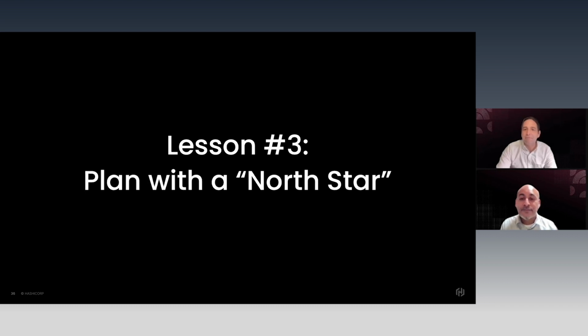Lesson number 3: come up with a plan and North Star principle ahead of time. Our North Star principle, that we needed to reorganize content instead of writing new content, wasn't something that we thought would be so important at the start of the project. We agreed upon it relatively early in the process because we were hesitant about accepting a project to fix the IA before anybody could agree on what that actually meant. In some ways, we just wanted to ensure that stakeholders didn't start to expect results that we never would be